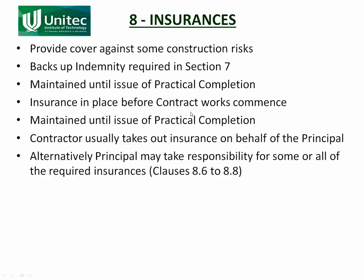The insurances are in place before the contract works commence and are maintained until the issue of practical completion. When the contractor has built what is required, the insurances no longer need to be in place. The contractor normally takes out the insurances on behalf of the principal.